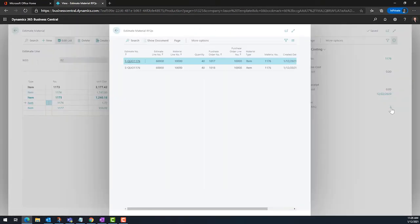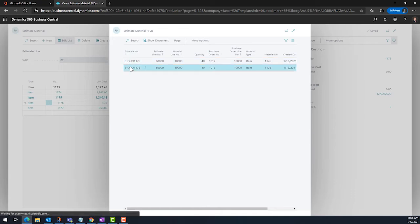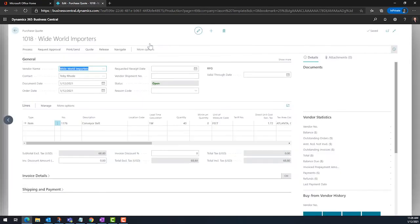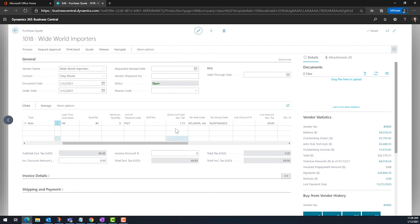As the responses are collected, RFQs are updated with current costs and validity dates. Acceptance will update the line on the estimate. The $1.72 from the item card is replaced with a quoted cost of $1.68.